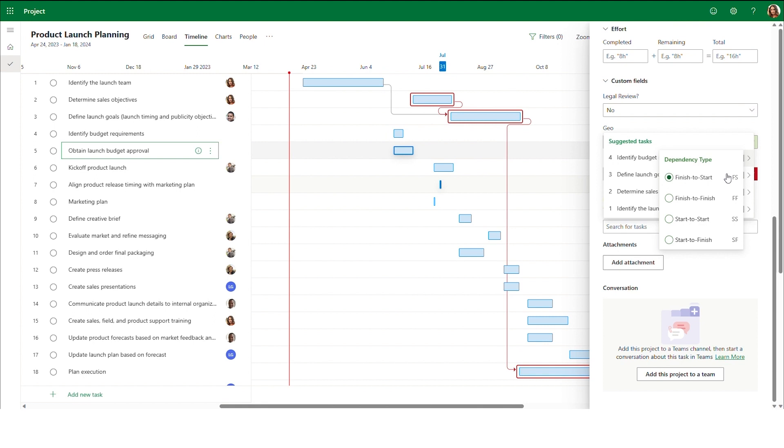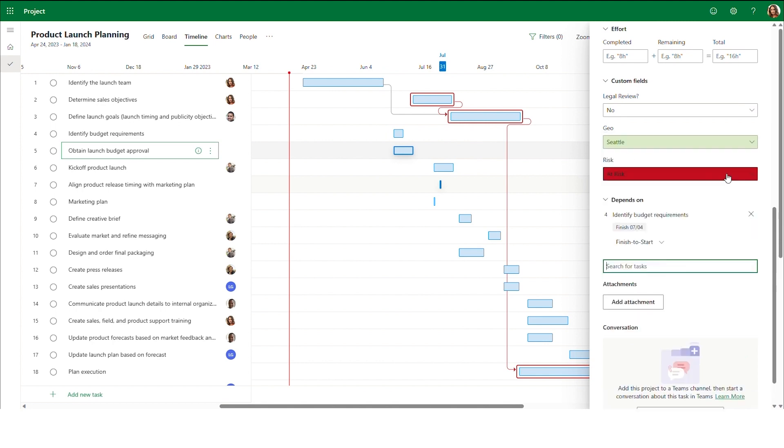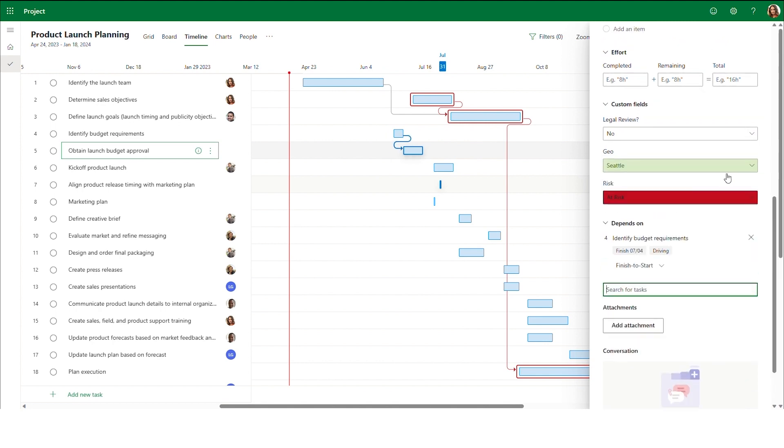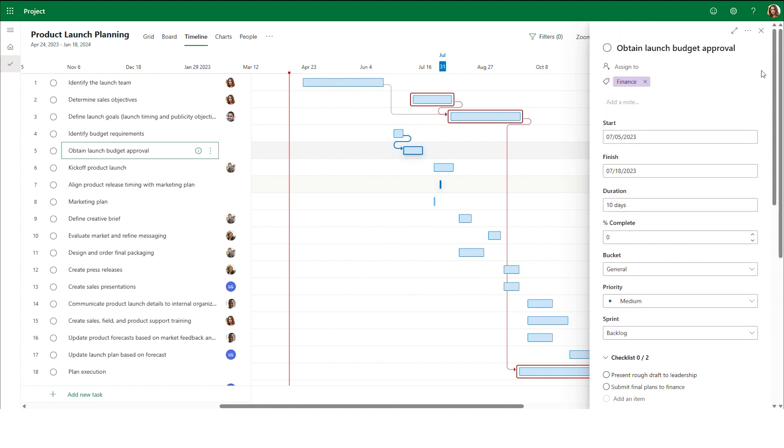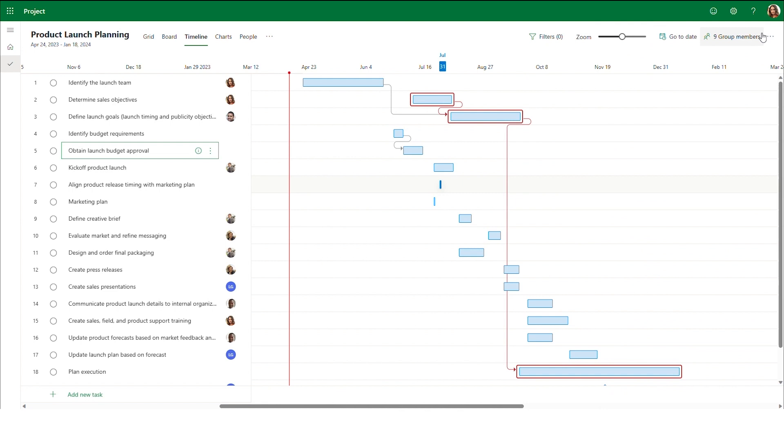With finish to start dependencies, the dependent task cannot begin work until the previous task is completed. For example, in the product launch project, we need to finish identifying budget requirements before we can start getting budget approval.